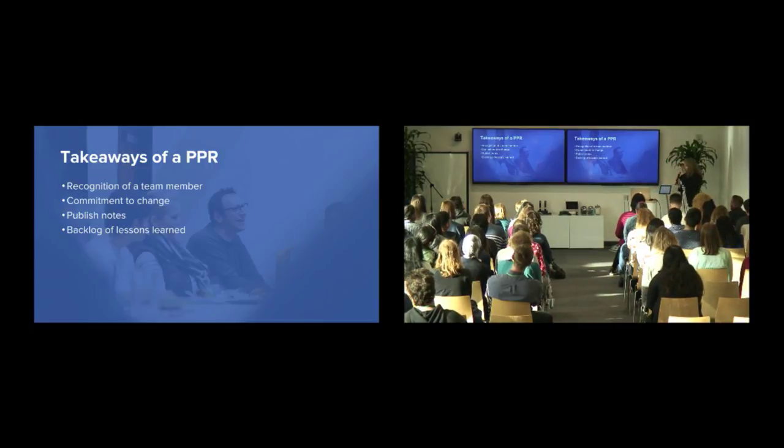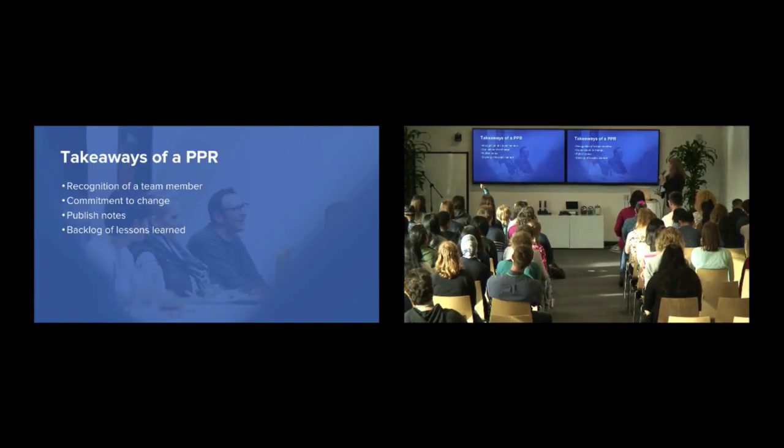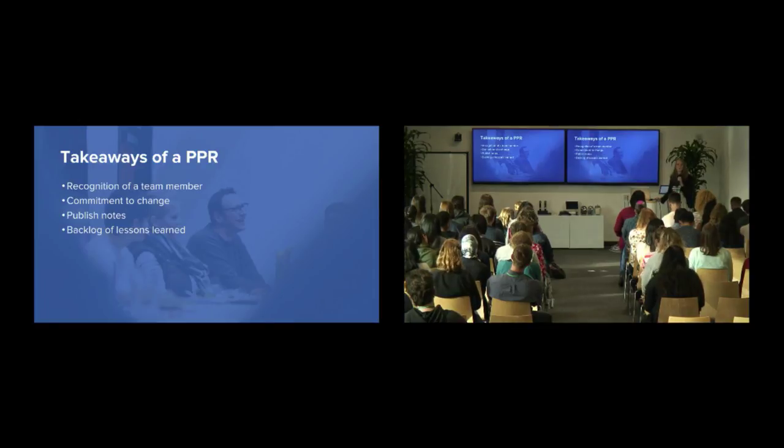And so lastly, the takeaways from a PPR. As you close down the PPR, we ask everybody in the group to do 2 things. The first is to recognize a team member, someone on the team that did something that either made their life easier, that they respect, that they are appreciative for, and it just cultivates this really great sense of teamsmanship, which isn't a word, but it is now. And then, secondly, we also ask everyone around that table to make a commitment to change. From their learnings on this project, what will they commit to change moving forward?